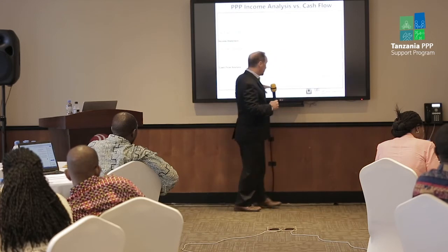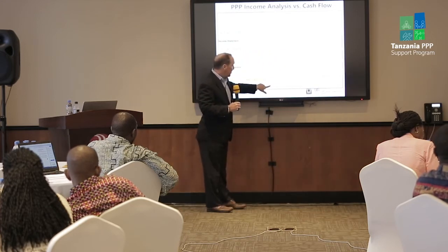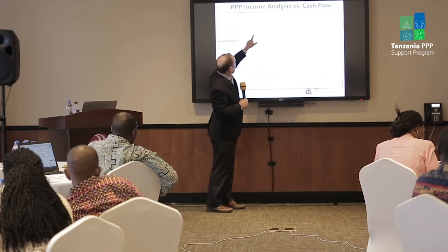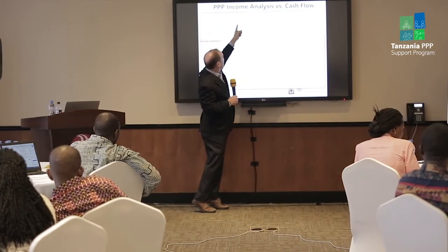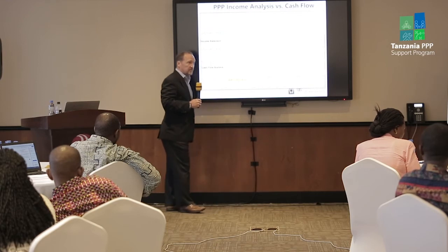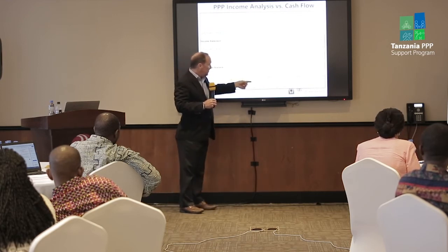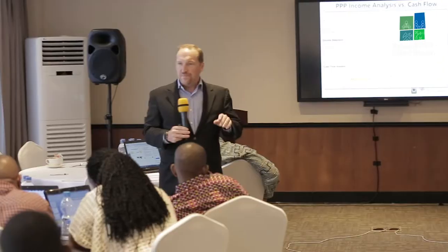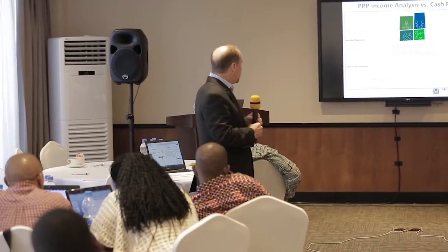It's the same, 14.16 million, that is total debt service on a 10-year loan of 75 million at 12%. And the ratio of 21 over 14.16 is 1.48, which we might say, well, it's generally in the range. Lenders would probably look more specifically at all the individual risks, but here we at least now see all on one page a financial model.